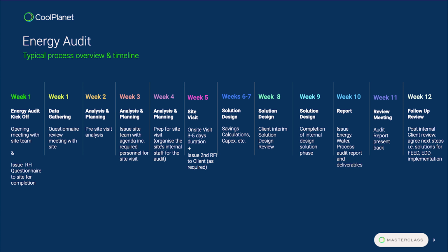The ones with maybe a priority payback are prioritized and delivered on, but then those other solutions are refreshed, maybe because at the time it didn't have as much of an attractive payback in terms of cost, but actually still had a very decent carbon savings. And we're seeing that a lot these days, that the criteria is starting to shift somewhat away from number of years payback based on cost savings. The tons of carbon saved from an opportunity is coming more to the fore. So I guess the increasing cost of carbon tax adds to that, and then also emissions agreements that companies have committed to, where you're going to be fined heavily if you don't meet them at some point.